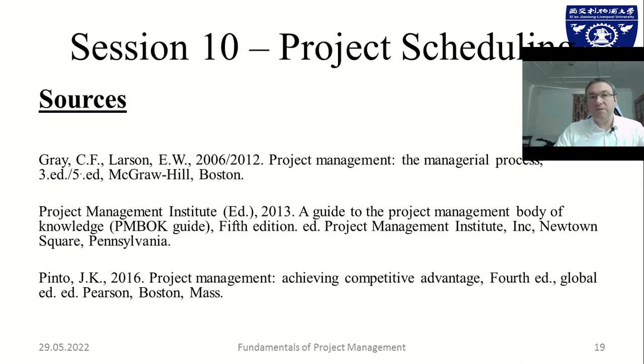There are other considerations to take when we are talking about shortening the project, because how are we going to do it? We need to add resources. For example, we could be working overtime, and we can have a look at what is the effect of authorizing overtime. It's not all positive, so while you have experienced people on the project that simply work more and consequently cost you more money, the absence of a fresh pair of eyes is unlikely to solve the problems that have led to the situation. So it's always a balance of how you are approaching this kind of duration dilemma when you are looking at, do you just add resources or do you do something else?